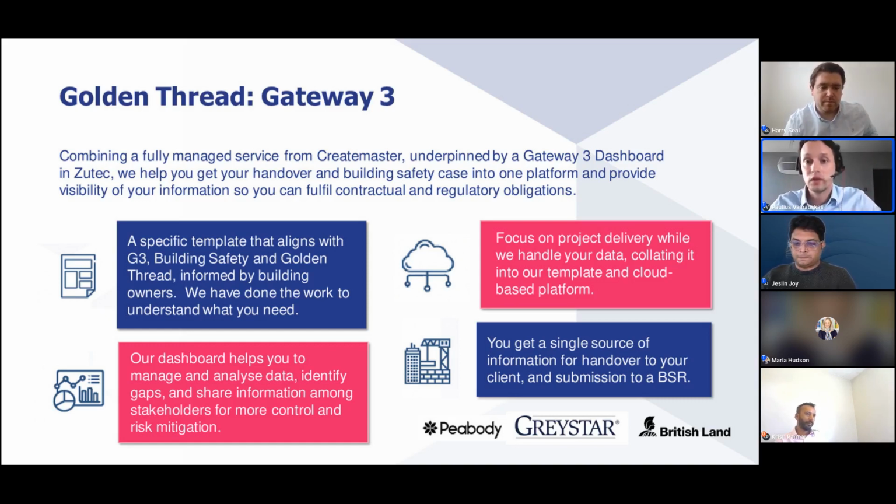And then Bond Bryan Digital, who manage the BIM and information management aspects of it, working together with us from CreateMaster, have helped us put together a master register of all of the digital records that we believe are necessary at Gateway 3, the point of handover, to hand over to the end client asset operator. So we have a digital template that is ready to use. And we have consulted a number of our key clients out there in the industry as to what should be included in that template as a starting point.